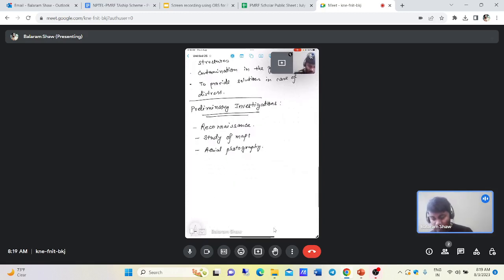So let us say in the preliminary investigation we saw that this site is unsuitable for our project. Then we'll stop the investigation further for that site. Let us say we have four or five sites where we can do the construction. But before that, we have to go for preliminary investigation. And after preliminary investigation, we saw that two of the sites are unsuitable for this construction. So now we will just reject those sites, and we'll only move on with the three remaining sites, and on those we'll do detailed investigation if required, and then we'll ensure that this site is proper for the construction.